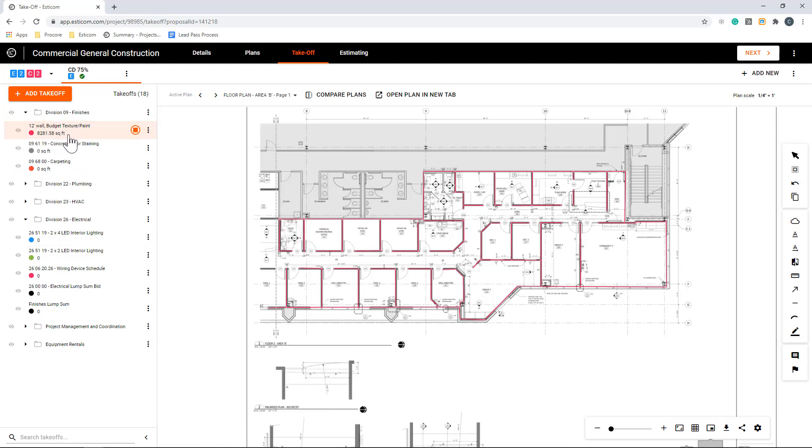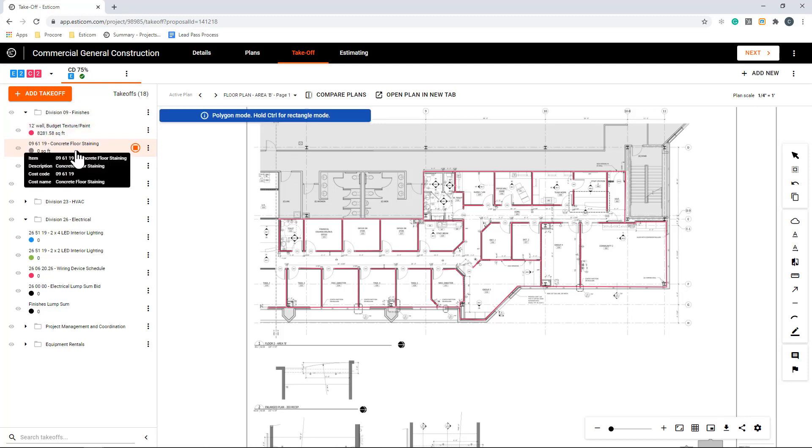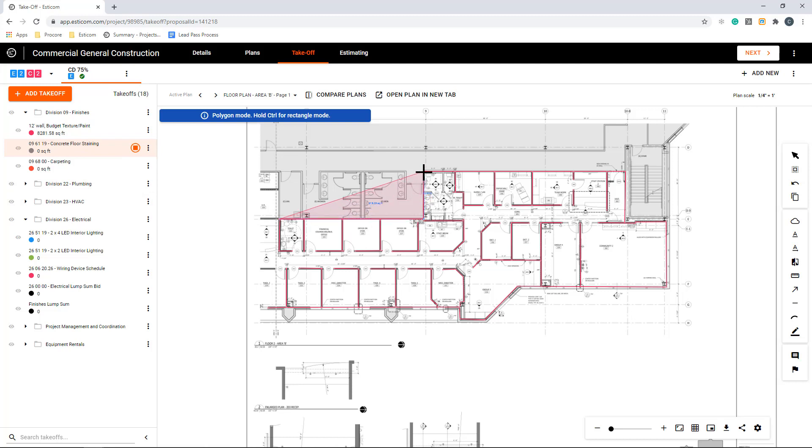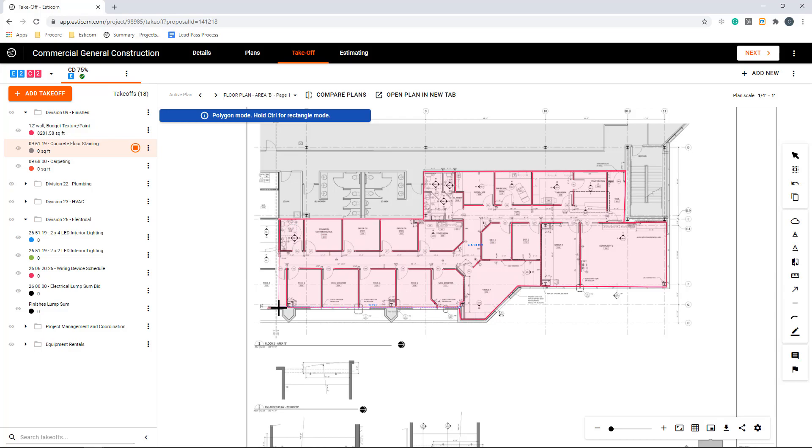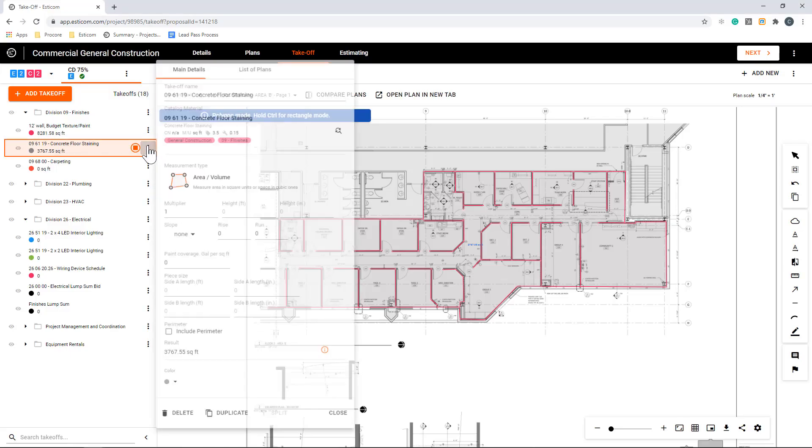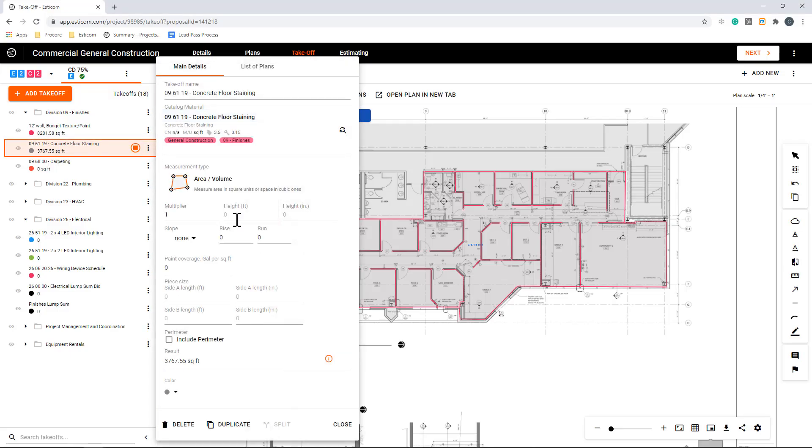Let's do a quick takeoff on the flooring to get a measurement for stained concrete. Just like linear, you'll use a single-click to begin the measurement and single-clicks to make turns. You can hold down the shift key to maintain straight lines and turn on 45s and 90s, and once again, you'll double-click to end the measurement. Now you can adjust the depth of the takeoff to get cubic yards or feet if applicable.